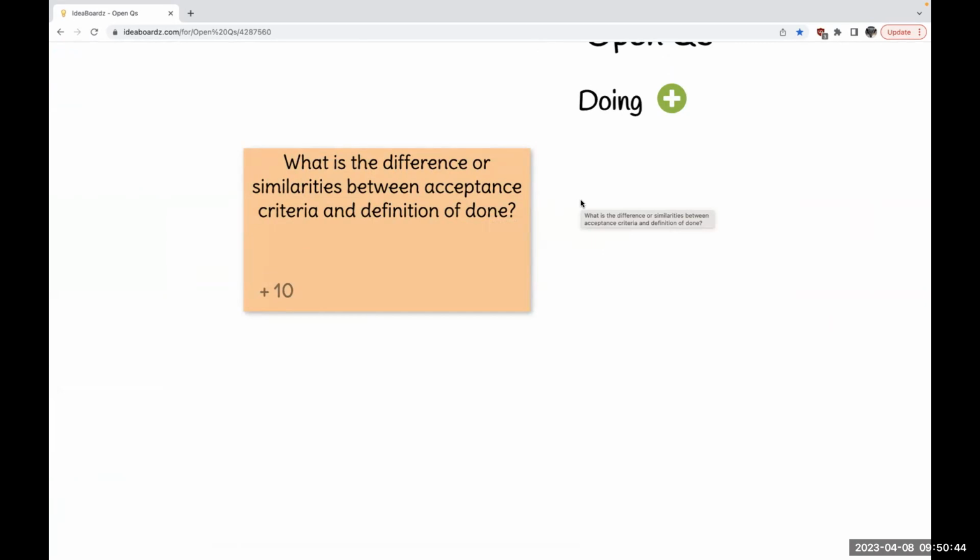That's basically what we're looking for. So to me, as a Scrum Master, a story is done once it goes through development, it goes through review, another developer reviews that work, okay? It goes through QA, and if it requires automation, it goes through QE, and then it gets PO approved.